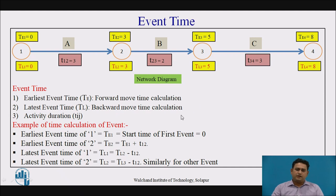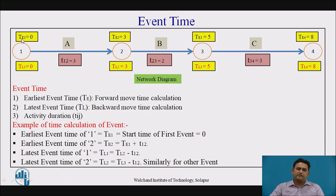Now let's start with the event time. In this particular diagram, we are observing the yellow color boxes which represent the event times. The above and below values are both event times. The earliest event time is represented with capital TE. TE1 means it is the earliest event time of event 1. Similarly, for events 2, 3, and 4, we represent capital TE2, TE3, and TE4. In the below yellow color box, we represent capital TL1, which is the latest event time. It is the backward moving time calculation, and the earliest event time is the forward moving time calculation.